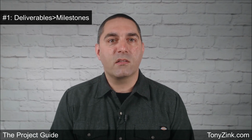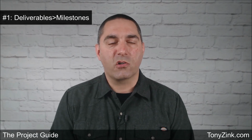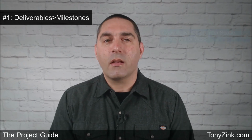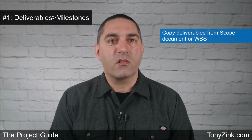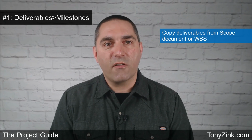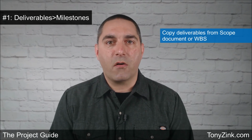If you've already created a scope document and a work breakdown structure, and I hope that you have by this point in your project planning process, then copy all of the deliverables from your scope document or WBS and transfer them into your project schedule. This will become the initial set of milestones that will establish the foundation and the overall structure of your project schedule.